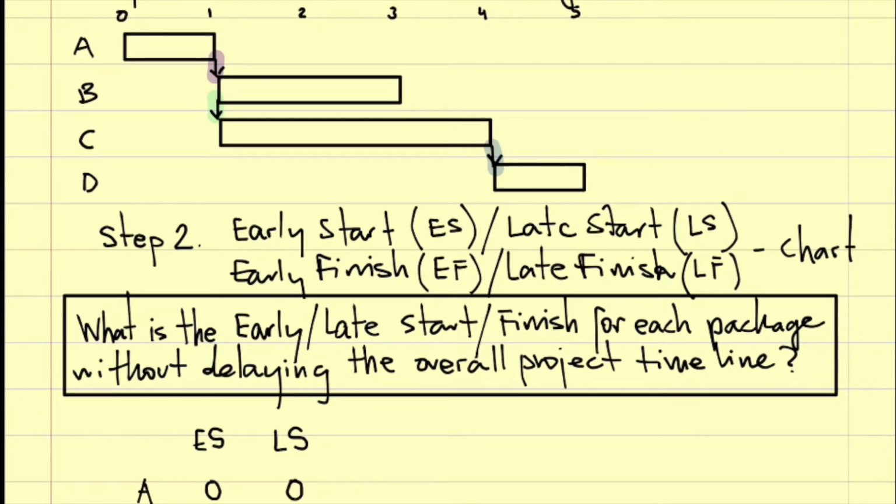Are you cool? So what is the early finish for A? 1. You notice that early finish is always early start plus duration.